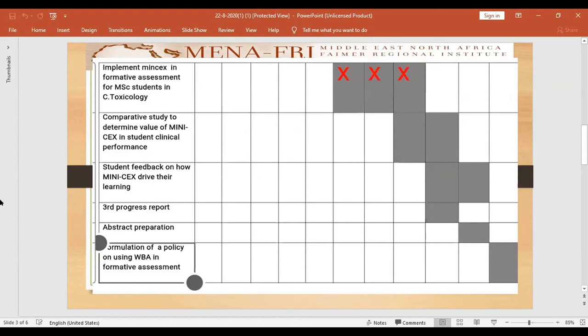Actually, this couldn't be done because we had in my hospital, my poison control center, closed for about two weeks, then transferred to another not-well-prepared place. There was some turbulence in the workflow, making it difficult to implement this formative assessment for postgraduate students.